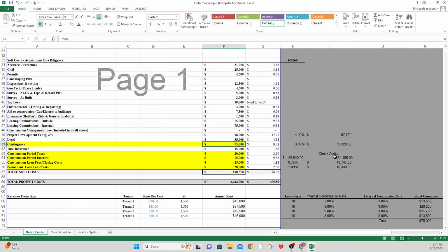But that gets back to the second point of $1,000 here, $1,000 here, even 10,000. You're not going to be able to sell this building if you screw up. So you need to have it in a way that you're comfortable with, and almost be more conservative. So even if you wanted to bump the development fee to $100,000, at the end of the day, if you keep raising the numbers, they're going to keep going up just based on the iterativeness of it, because it's always going to be based on 4% of the total project cost.